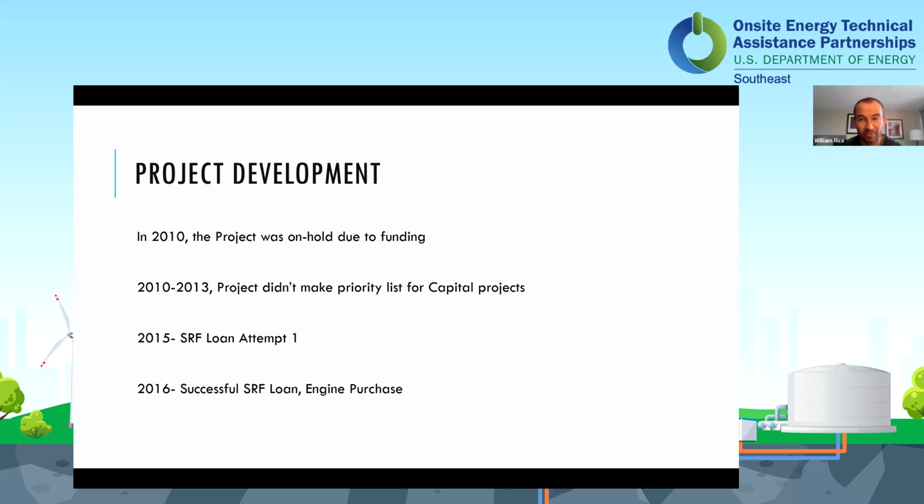The project had been part of the conversation for a long time, but with water and wastewater capital projects lists, and especially with a lot of projects that were compliance required, right? Making clean water as a part of compliance is our core business. This project never really made the cut. We were always project 101 on a list of 100 projects that were going to get done. So it continued not to get funded in the list.